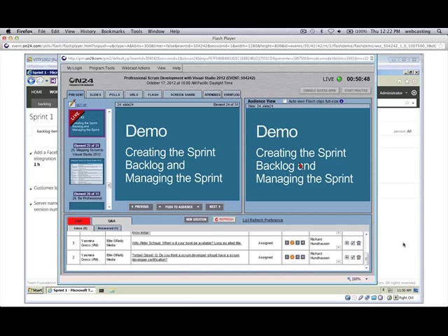But it didn't take long in the first place, so do it during sprint planning in the next sprint. What I really don't like to see, though, is people going, well, I already know the tasks around those PBIs, and let me go ahead and start pre-creating some test cases around that. That is complete waste until the sprint in which you're actually committed to working on that.